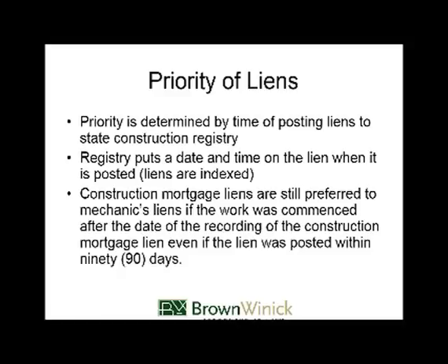So we talked about notices. We talked about posting of liens. The next item that people might ask about is what's the priority of liens? This is a little bit different than what we had before. Priority of liens is determined by the time those liens were posted to the website. So if I post mine now, you post yours 5 minutes from now, my priority will come ahead of yours. This is somewhat different than before, where there was some relation back, but the code now says priority is determined on the time of filing.